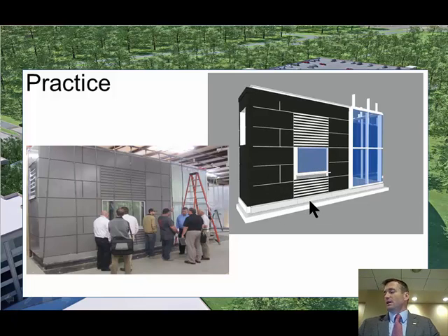The subcontractors figured out what an origin point was and how to align those models. They figured out that on the details in the plans, this curb that runs underneath, at one point in time the designers had part of the building with a curb and part of the building without a curb. And so on this mock-up we said, well, we've got to transition from curb to no curb. So we put that in the mock-up.